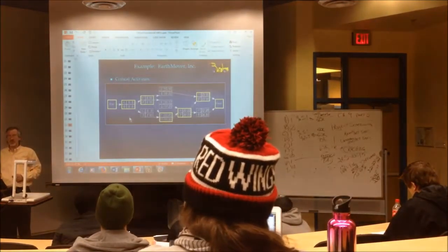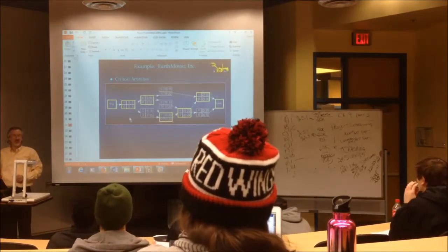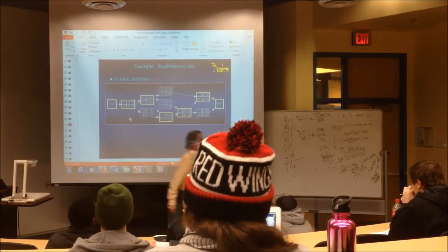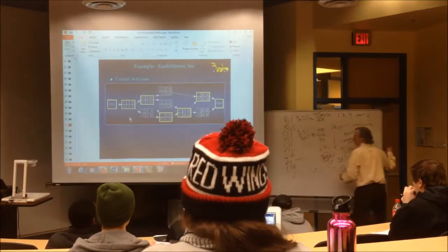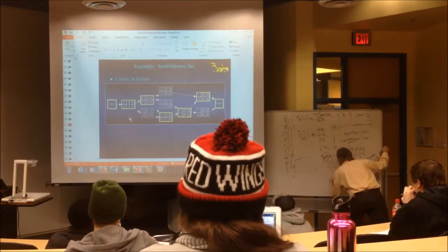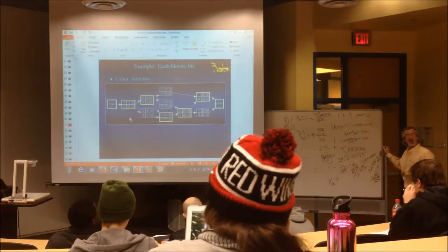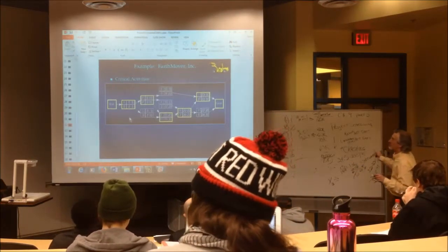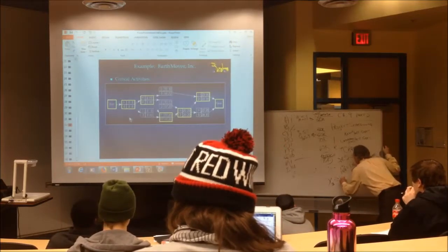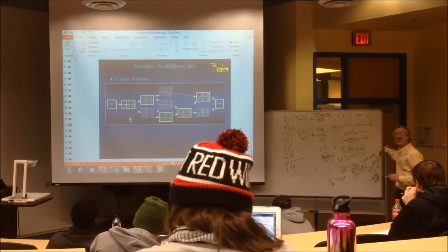Okay, look at B. Everybody just look at what precedes it. Okay, here we go. I'm going to write it right here. It says, write the x variable for the activity you're writing this for, x sub B. Make it greater than or equal to the x variable for whatever activity precedes it. So this would be x sub what? A. Add, what is the normal time before crashing for activity B?